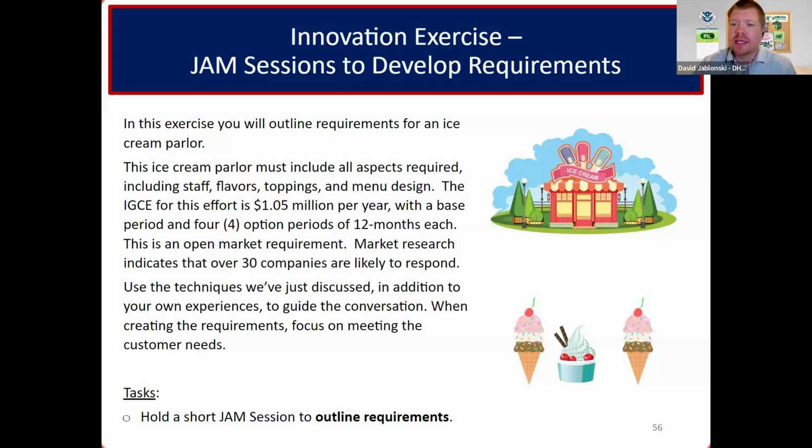So a down select is basically you're splitting the procurement process into two parts. We call it a phased procurement approach. And you have two types of down selects. You have an advisory down select, where you advise someone to either proceed or not to proceed to the next phase, where they then choose whether they're actually going to proceed. They can take the advice or not. We found it's a little over 90% success rate that when you, as the government, advise a vendor not to go to the next phase, they will take your advice and opt out.